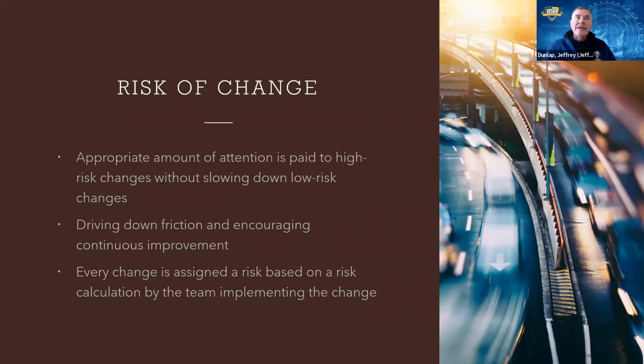They're saying let's have a process that basically looks at risk, and we assign a number to it. Let's figure out a process where everybody agrees that if this is a major change in capability or features or functions, the major stuff gets looked at, and the other stuff, a minor change, we can just automatically push out. Okay, you guys tracking with that? So he basically says, let's do some sort of calculation. Let's have some sort of risk determination and figure out what it is.